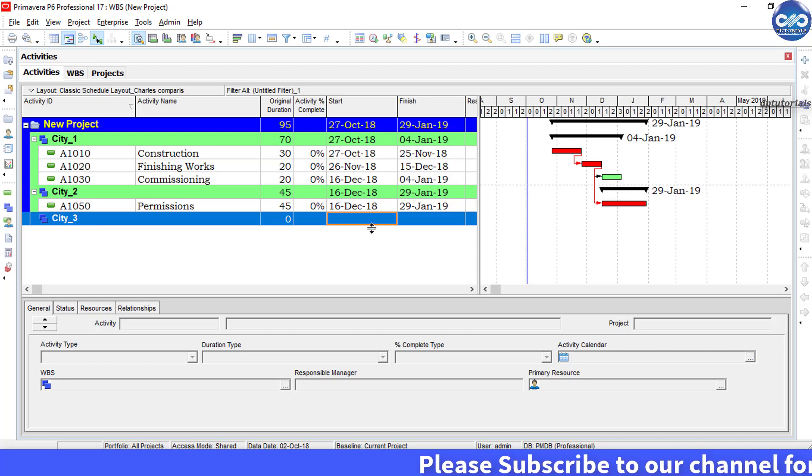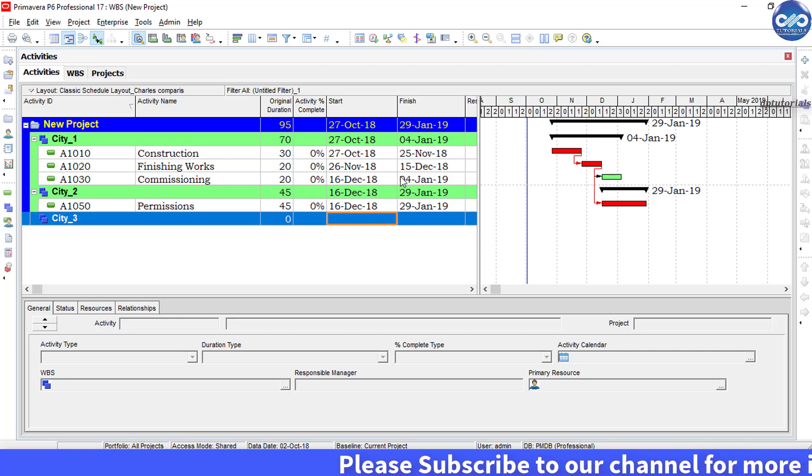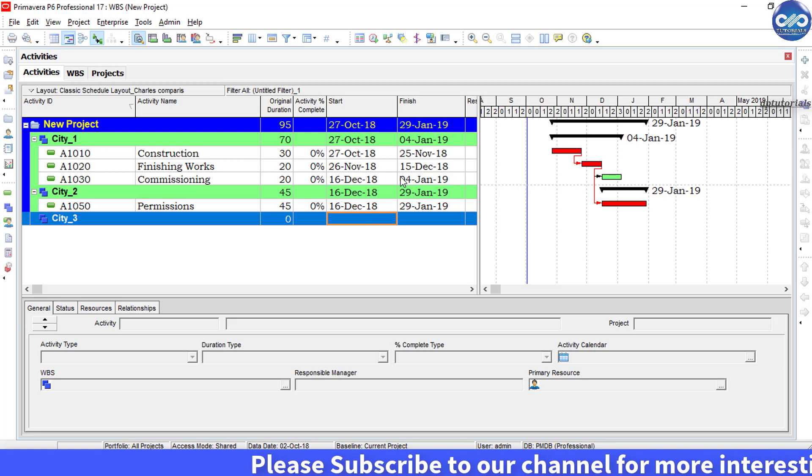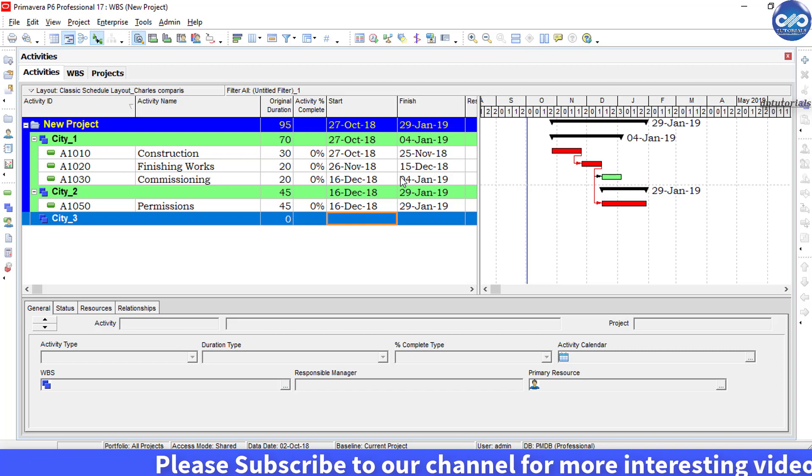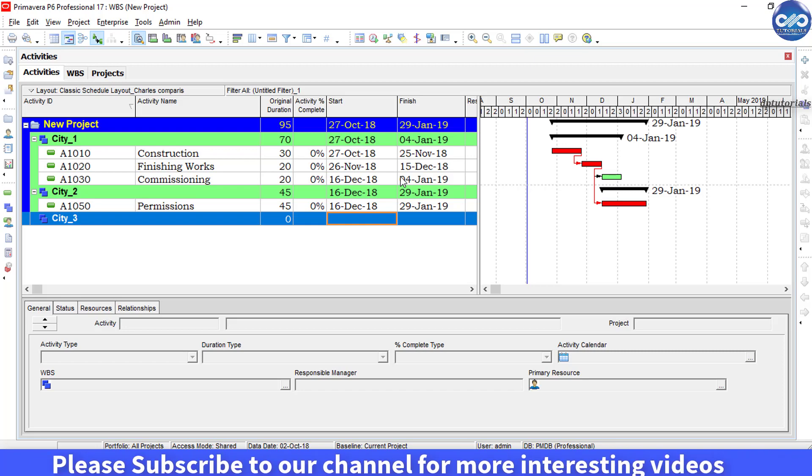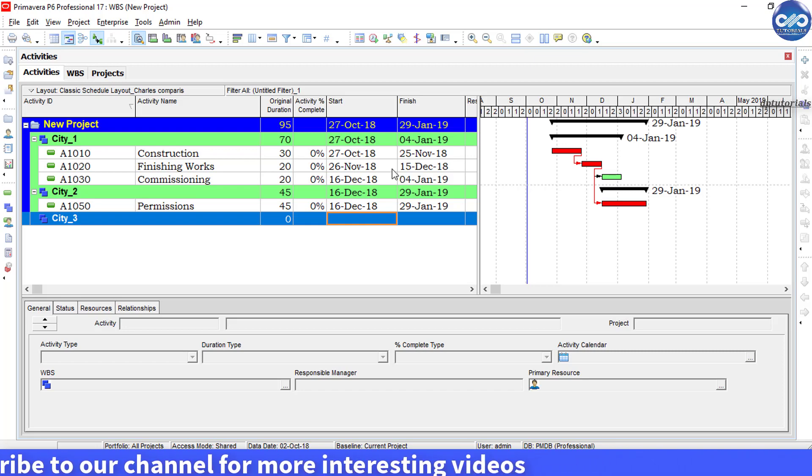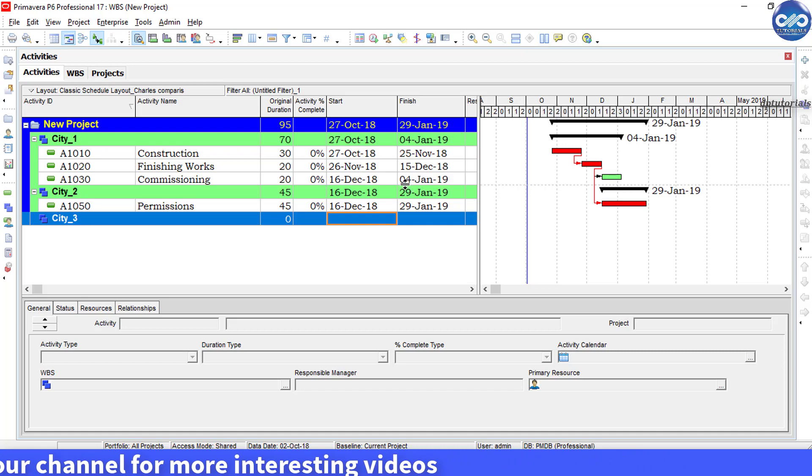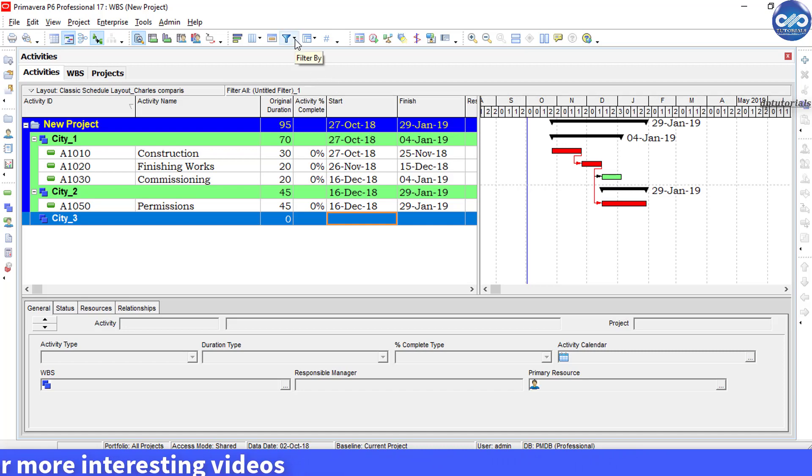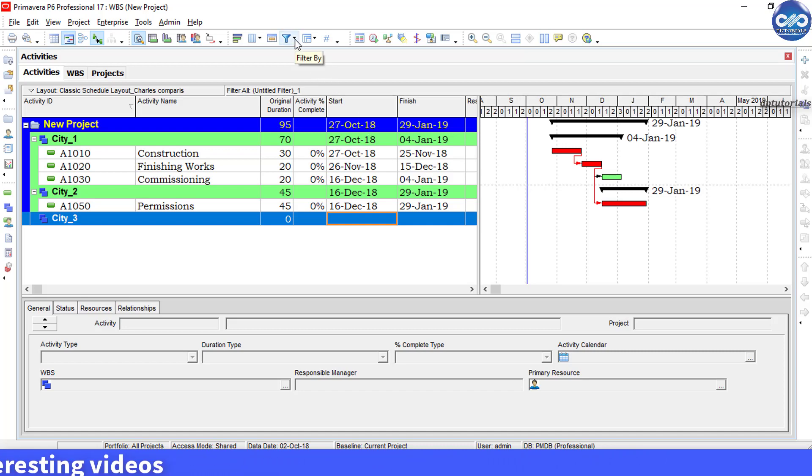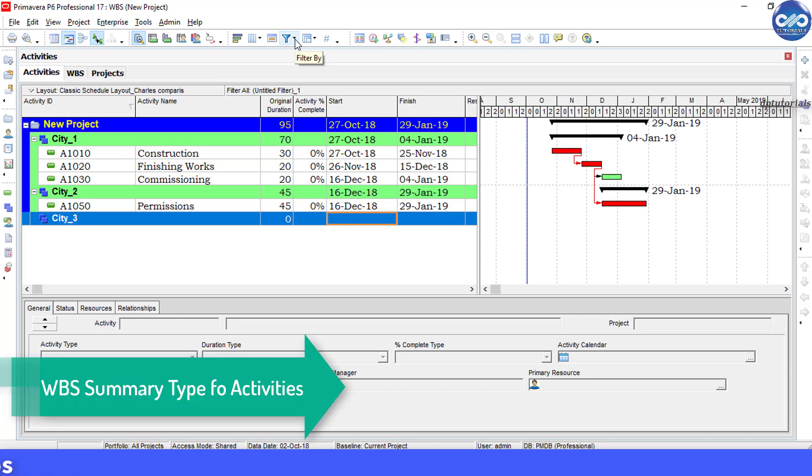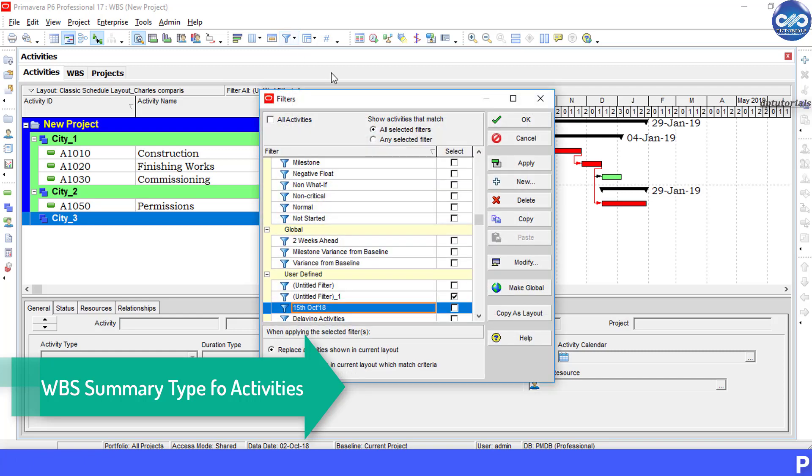So this is where WBS summary type of activity will come into play. We will show you how to create this WBS summary activities in each city. Click on remove the filter to go back to the original project.